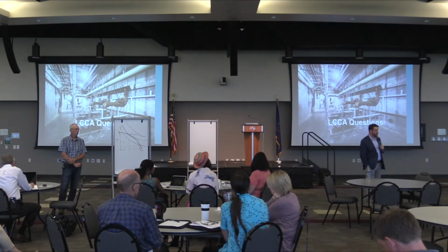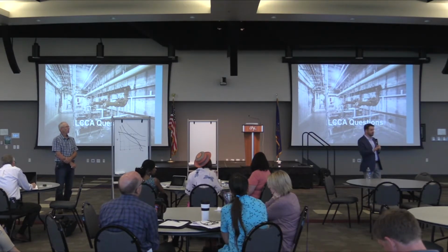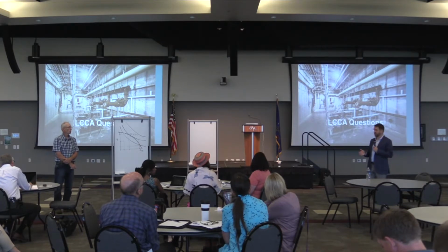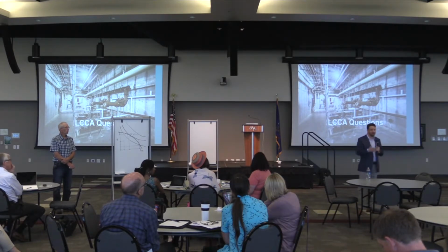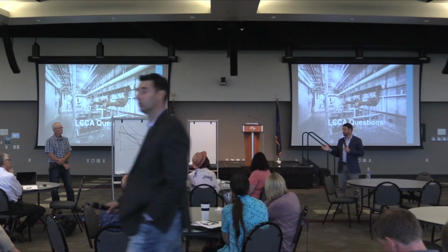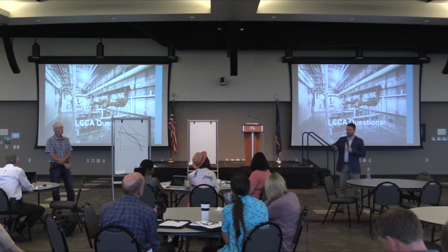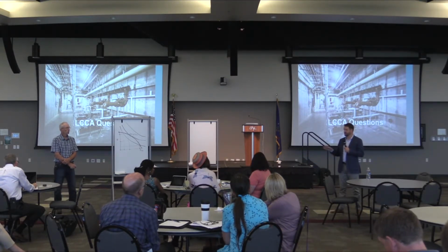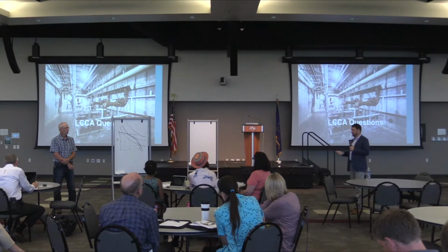Pat, I would just add to that. There are federal agencies out there, for example EPA. If you're doing a water supply project, a clean drinking water project, as an applicant you're going to the State Water Commission, doing your LCCA to get funding here, and maybe you're also going to EPA for funding because the project is really going to improve rural water supply. EPA has an ability-to-pay analysis that has to be applied for as part of their application process. That is not part of this State Water Commission program. The LCCA is simply the economic analysis, nothing financial related to it. So ability to pay, bonding, rate studies, none of that is what we're looking at here.